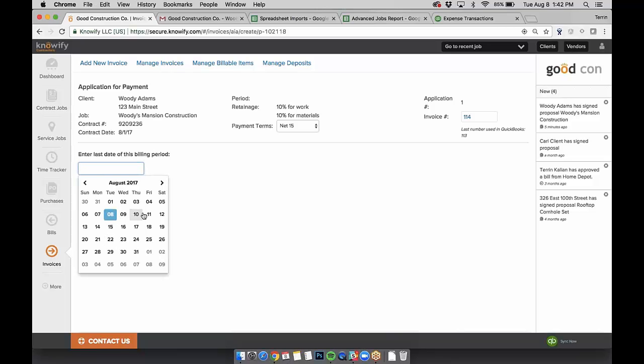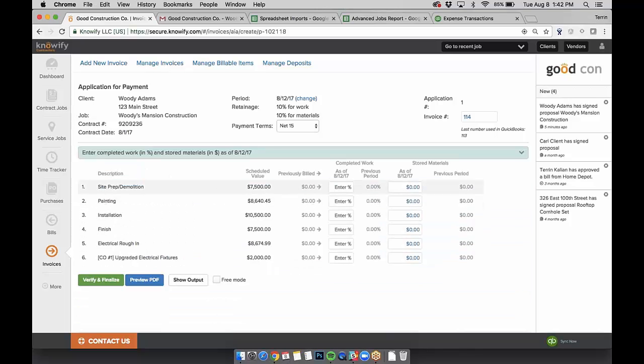You know, the last day of the billing period, we're billing through the end of this week. And I can plug it in kind of the classic format where I say, we're going to invoice the first 50% of the work we did on demolition, and we're holding on to $2,000 in materials. For painting, I still have $3,000 in materials. I've only started 10%. And for installation, we actually sent out an invoice for $4,000 just to purchase what we're going to need, but we haven't started the work yet. You can see the change orders in here as well, just so I can invoice that as well. All I have to do is click here to get to 100%, or I won't leave anything in here yet.